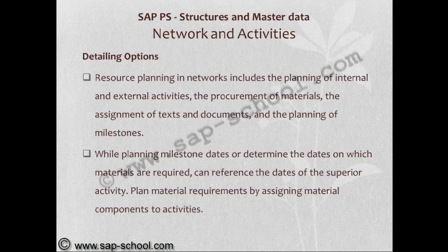Resource planning in networks includes the planning of internal and external activities, the procurement of materials, the assignment of text and documents, and the planning of milestones. While planning milestone dates or determining the dates on which materials are required, you can reference the dates of the superior activity. Plan material requirements by assigning material components to activities.